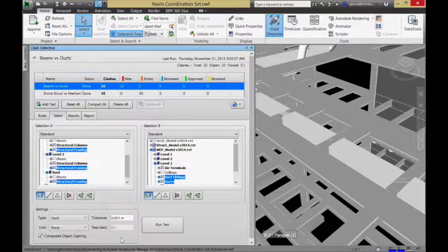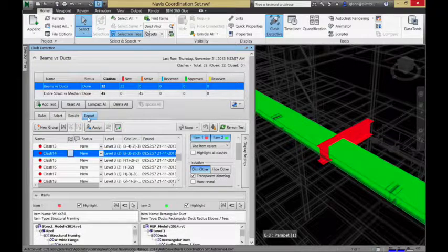So, an incredibly powerful tool. Now, finding all the clashes, giving you the list of the reports, results, and ultimately producing a report is a great starting point, but it is still a little bit hard to go through and manage all those things. What's happening in a lot of BIM meetings on job sites is getting everyone together and trying to figure out how to resolve all these clashes. Because for every clash, the issue is, okay, this is clashing with that. Really, what is the best strategy for fixing it? And the computer won't tell you that. The computer can only report to you where the problems are. The expertise of the people in the room really guides how these things should be resolved.